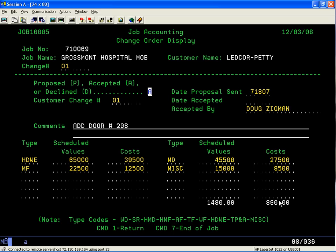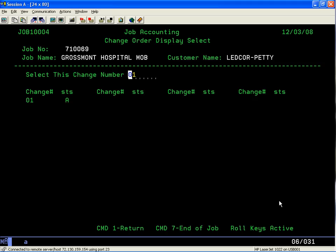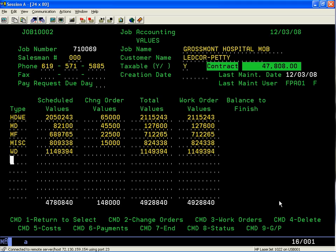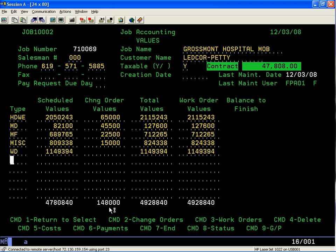We know that we have an original contract value of $47,808, and then we have a change order value of $1,480. As you add more change orders and follow this procedure, your change order subtotals will always keep increasing or decreasing, whether it's a credit or net add or combination of the two. It takes the total values—your original schedule values and your change order values—and totals it to $49,288.